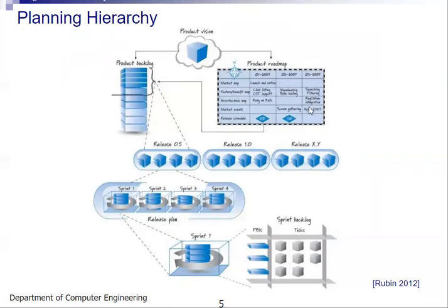A roadmap can be your sprint planning, and then basically you have to plan a release. Like this much you will be trying to release in first release, second release, third release, right? So to have that release, you need to do the sprint planning, right? So like for this release you need to do sprint planning. So you will have the sprint cycles, like 4 sprint cycles for this release, version 1, right?